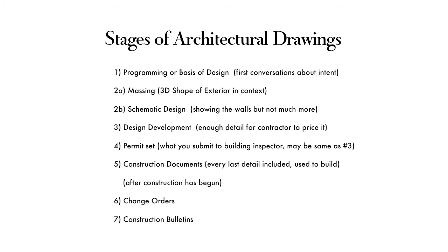From there, you're going to phase into some level of DD, or design development. And again, you're just continuing to develop the drawings. You're continuing to pay the architect and the structural engineer and whatever other engineering and design disciplines you have on board at that point to further develop the building so that you can get through your approvals process and so that you can get funding for the project.